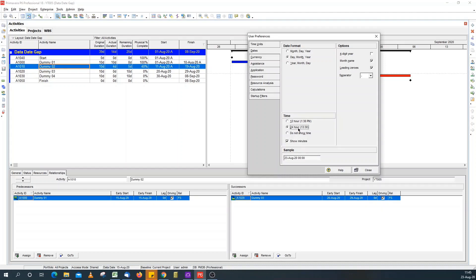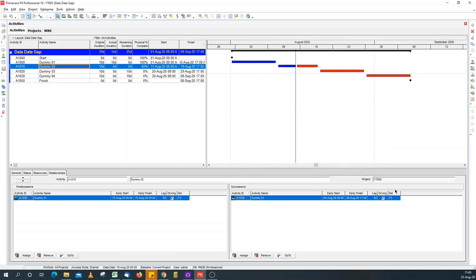I normally go for 24 hour time period. And I always show minutes. That's when updating.